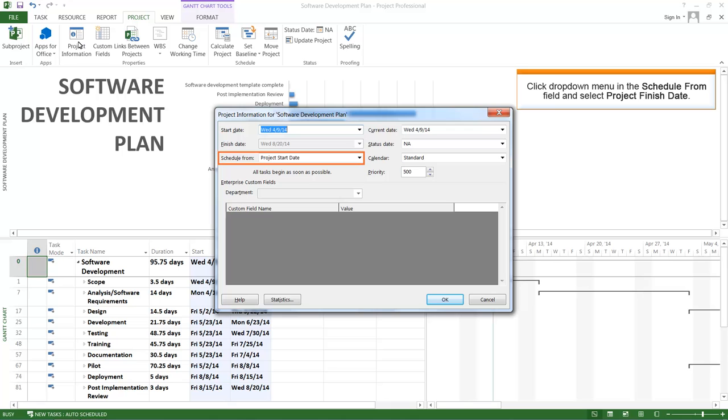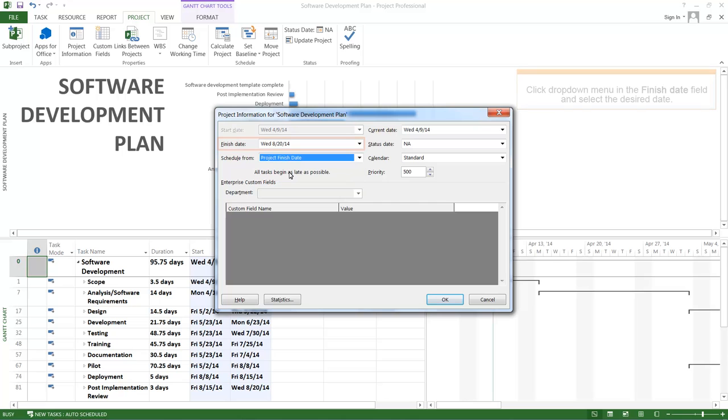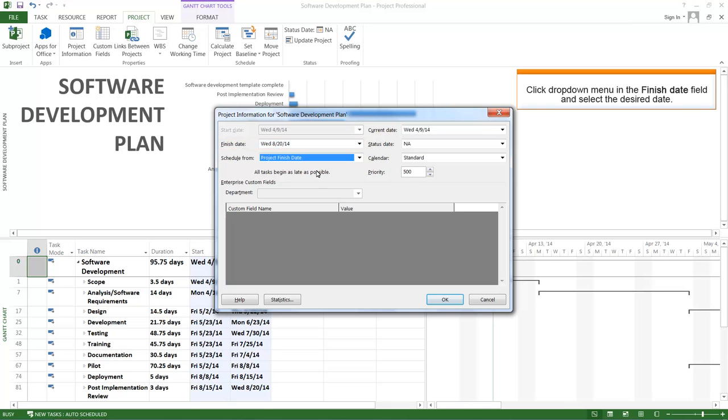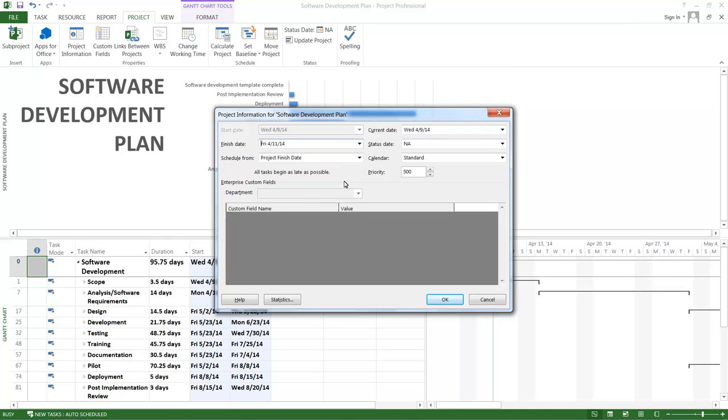Click the drop-down menu in the Schedule From field and select Project Finish Date. Click the drop-down menu in the Finish Date field and select 4-11-14. Click OK.